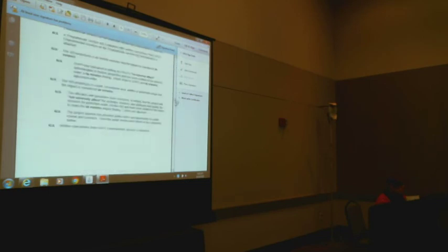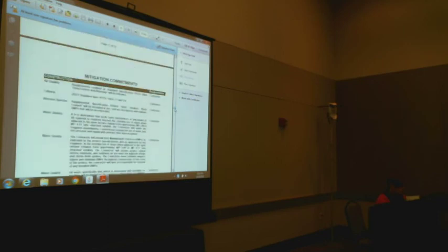I'm going to scroll all the way to the bottom. Here's our commitment page again. So here's something that Region 2 does that I think we're probably going to start doing in all the regions. It's an environmental commitments page. So basically, it gives the option for the region environmental manager to go to the project manager and the district engineer and let them know that there are commitments on this project. So if there are no commitments, if it's just standard specs, you know, the standard BMPs, the region environmental manager can sign off on that.